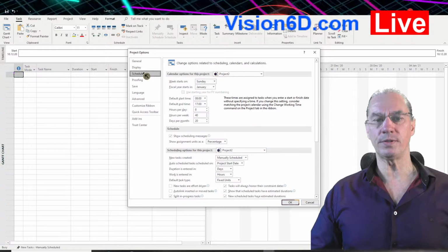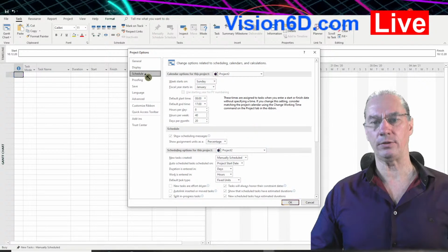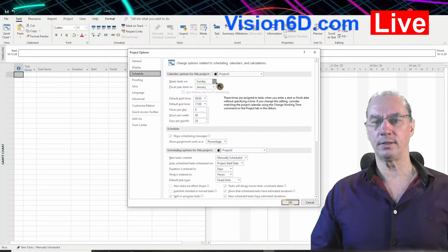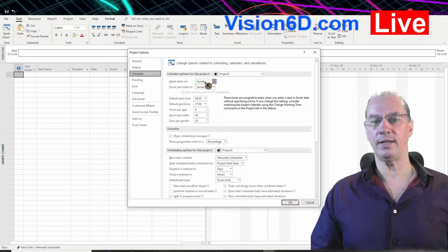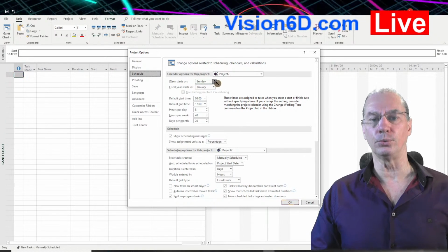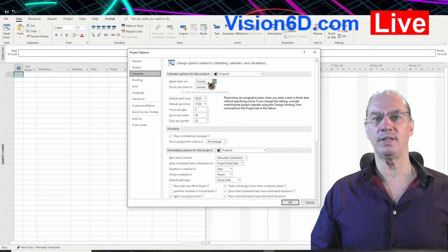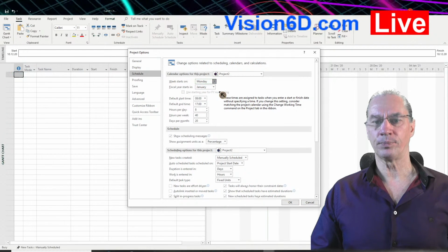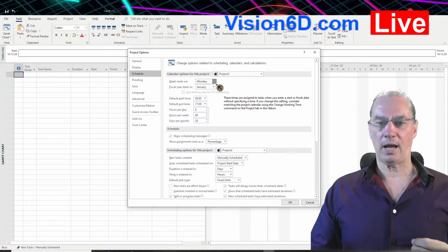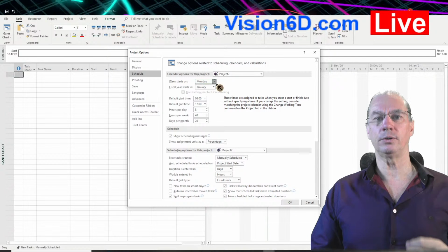I went directly into the Schedule part. You see that you can say here, for example, when is the start of the week for you. You see that by default it sets this to Sunday. It's not the case in how I work; we start the week on Monday.